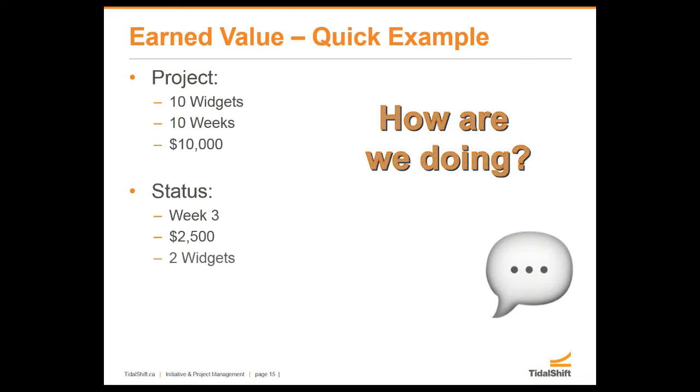That's what earned value's basis is: how much product have I created, how much have I earned. Without that key piece of information, you're out of context. You've got some data, but you don't have any information. Because if I had actually built 3 widgets, then yes, I'm under budget because I'm at $2,500. I should have spent $3,000, and so I'm spending less per widget.